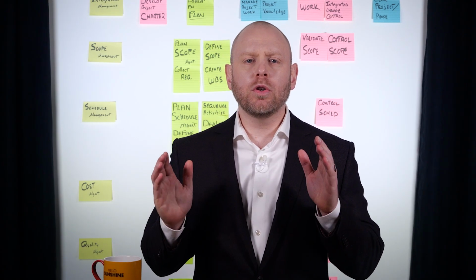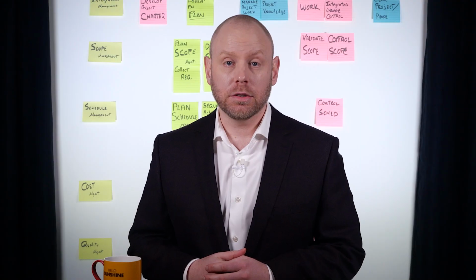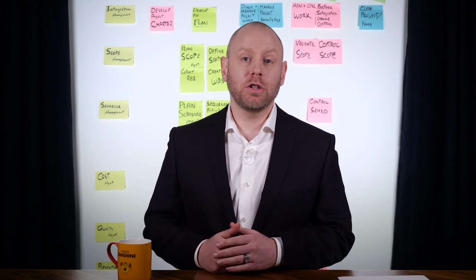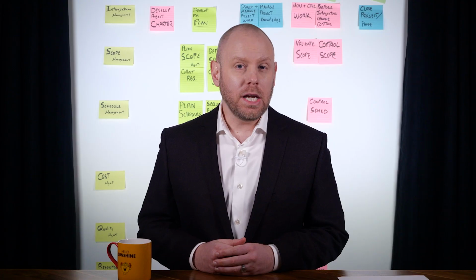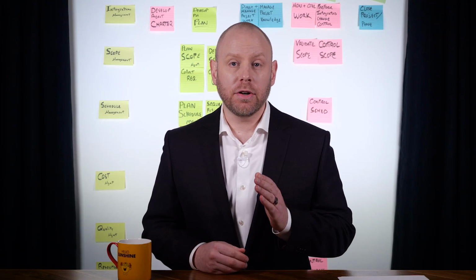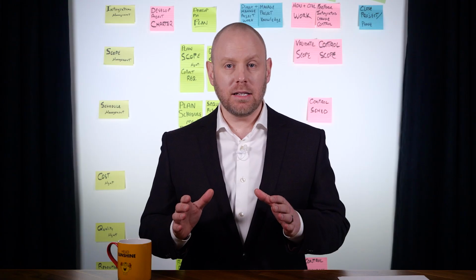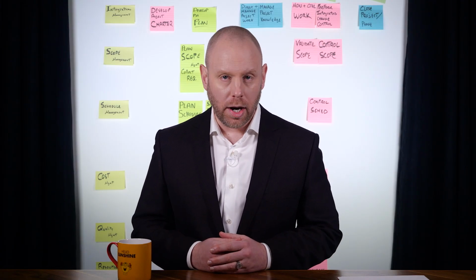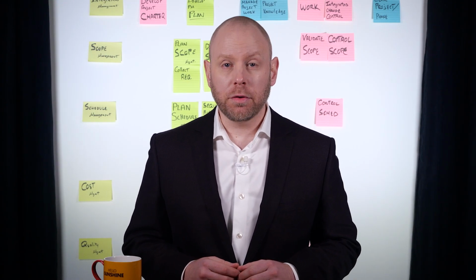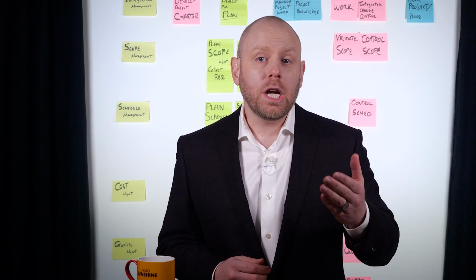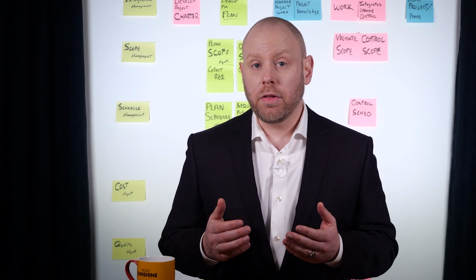In an earlier episode, we identified our stakeholders and built our stakeholder register. Now we need an effective plan to engage these stakeholders. We need to recognize their different needs for information and begin a continuous process of reviewing these needs and updating our plan as required. Milestones that would prompt us to review our plan could be the start of a new phase in the project, or a change in the organization structure or within the industry.